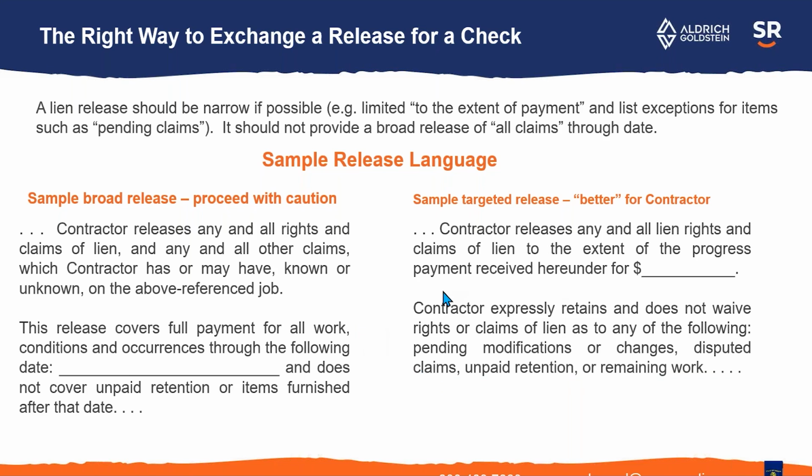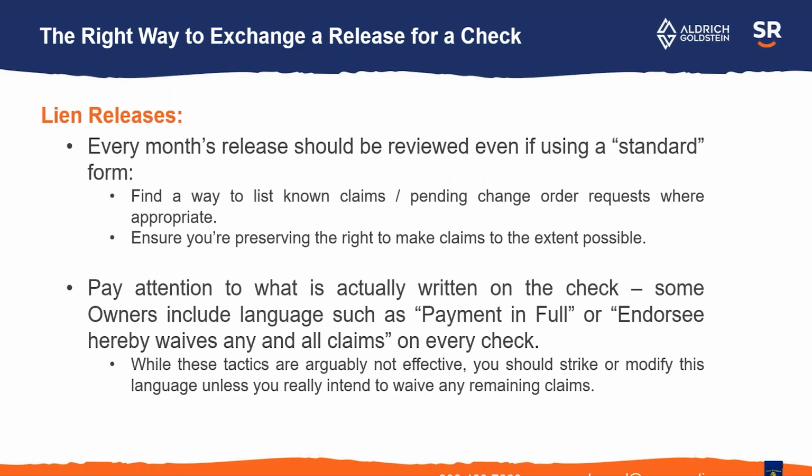A lot of times if a project starts to go bad, especially we'll see that on big commercial projects, everybody is marking up the releases, the owner is trying to change it, the GC is trying to change it. So you just have to be aware and review every month's release. Make sure there's no language that wasn't there the month before. That's kind of the best way to protect you.